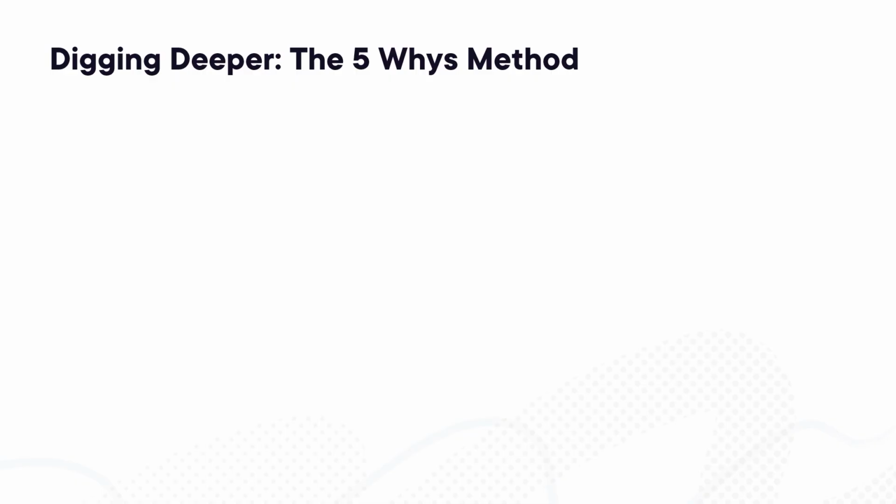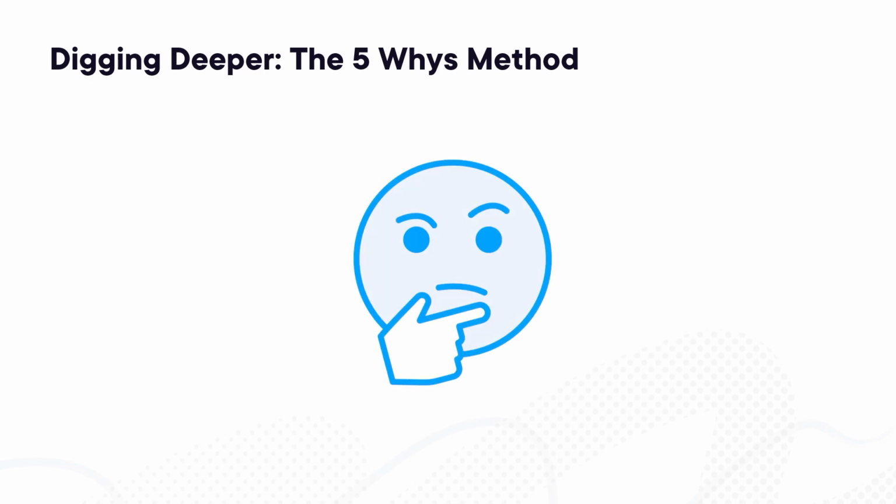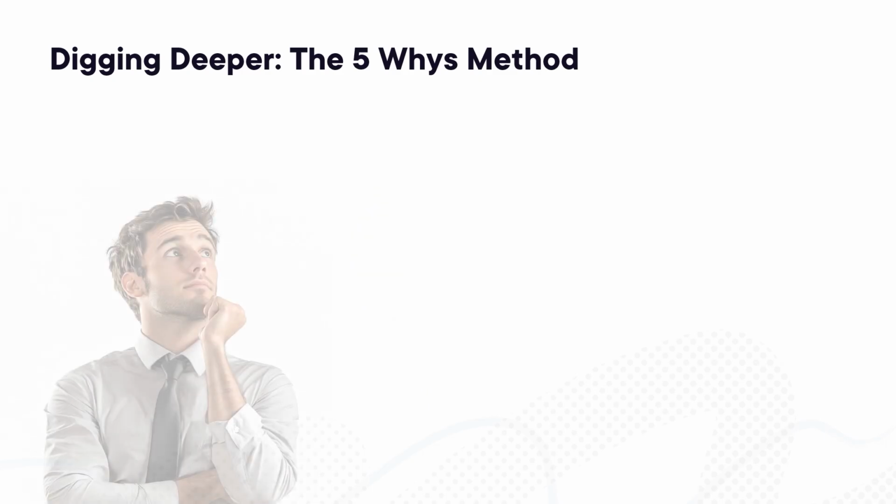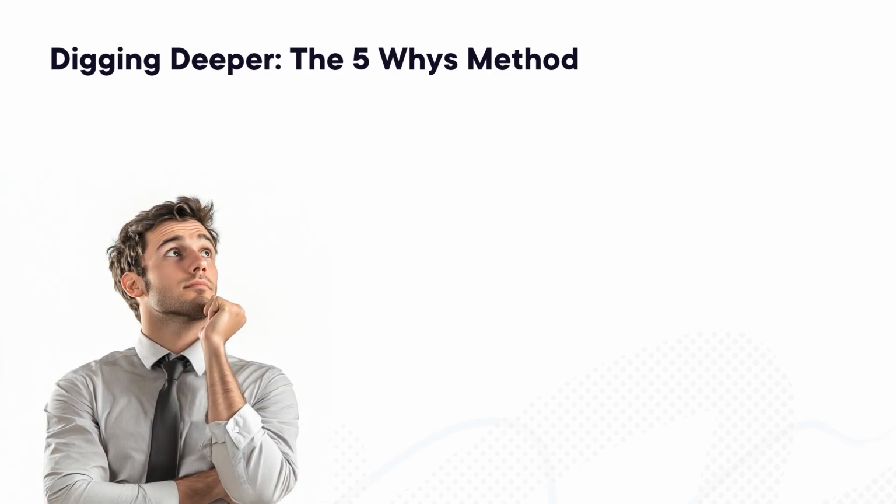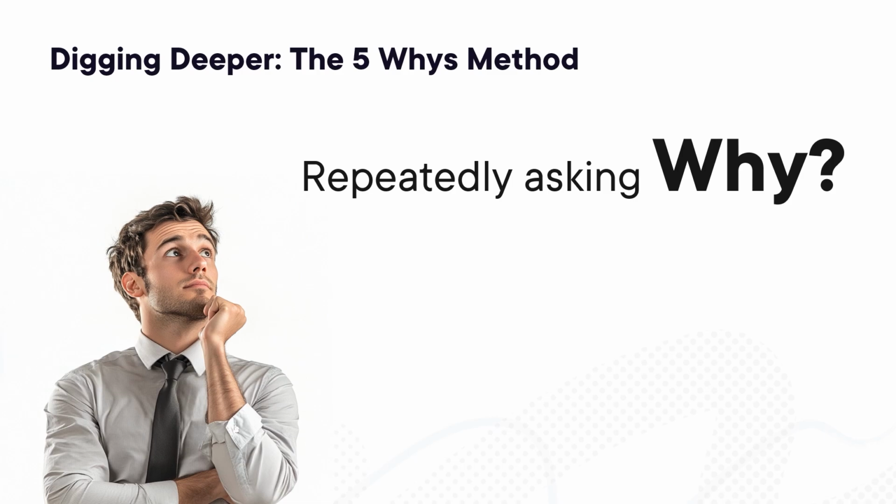So let's dig a bit deeper and talk about the 5 whys method. It's a simple yet powerful problem-solving method designed to identify the actual root cause of an issue. So here we have a security manager wanting to dig down to the root of some issue. Well, by repeatedly asking why to each answer, we dig deeper into the problem's origins.